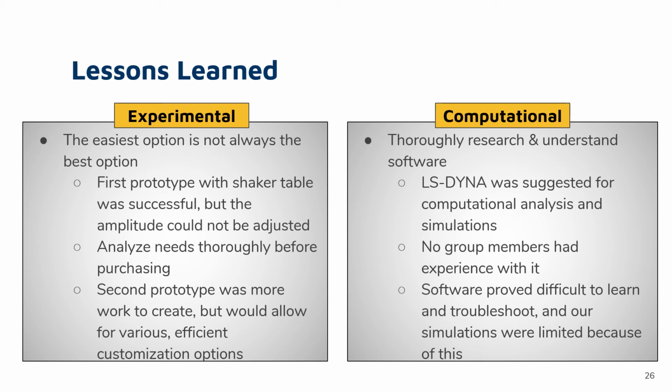more customization options. On the computational side, the major lesson learned was to understand the software we were planning to use before we decided to use it. LS-DYNA was suggested as a software that could be used to simulate the effects of sloshing, which it was, but we did not have experience in this software, and this is where a majority of our problems arose. We were overconfident in our ability to learn the software quickly, and when it proved more difficult than we expected, we did not have many options.